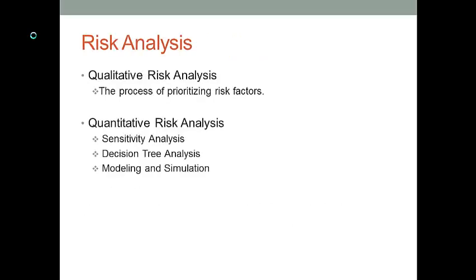After we identify the risk factors, the next step is to analyze the consequences from the risk factors. We can choose either qualitative analysis technique or quantitative analysis technique. If you choose a qualitative analysis technique, basically you want to invite the expert to use their past experiences and knowledge to prioritize the risk factors. But with more and more data available to us, in practice, we usually use some quantitative analysis technique to analyze the consequences from the risk factors.